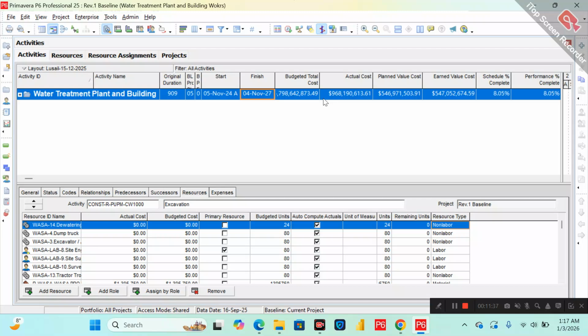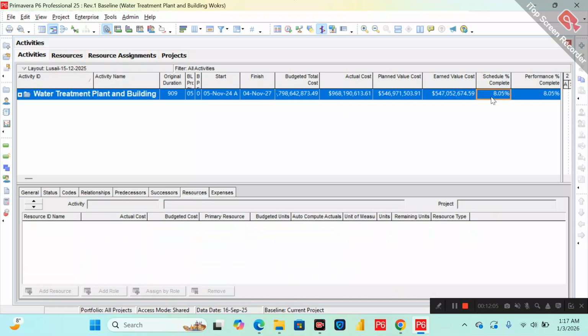So in the next session, as you see, this is the revised work program. In the revised work program, or recovery extension program, or any catch-up plan you are going to prepare, you must have equilibrium at all levels, either the dates or the earned value statistics. At all levels you should have equilibrium. You can see that in my program, the overall percentage is equal. This is basically the meaning of a revised work program.